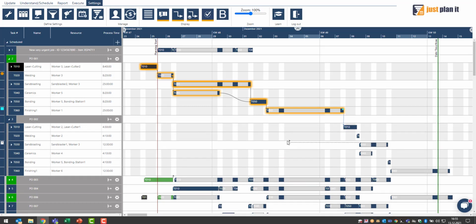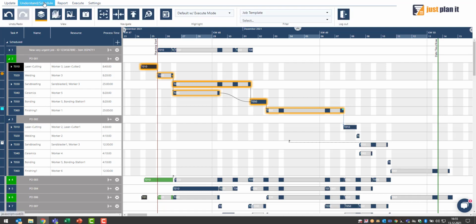Now we have this flag symbol, and if there is a time distance between the point of time where you have set the time constraint and the scheduled start, you get this dotted line that gives you the reference between the initial constraint and the scheduled task. And this symbol you also find now in the symbols line, which we also have in the resource-centric views.